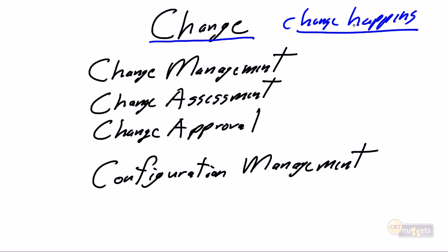IT projects are going to have change. The flip side to that is homeowner comes in and says, yes, I know there's carpet, but I want hardwood. The builder says, fine, my carpet is spec'd out at $14 per square foot, and hardwood is going to cost $20 per square foot. Therefore, there's a $6 per square foot change. Will you approve the change? Homeowner says, yeah, absolutely. I knew the hardwood was going to be more expensive. Here's my approval to spend that extra money. Please go ahead.